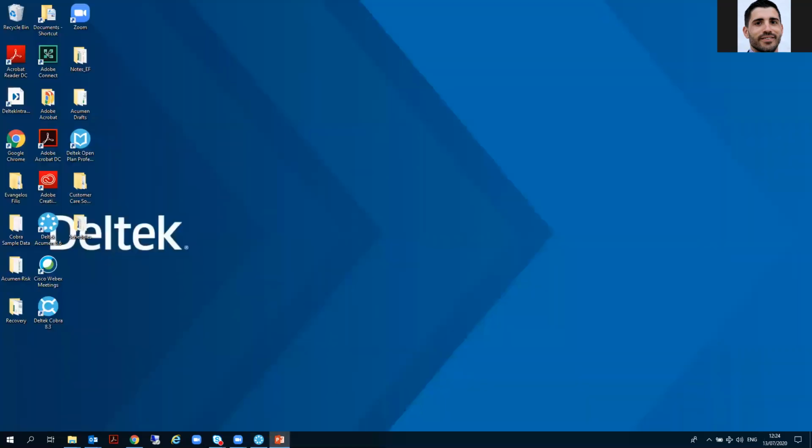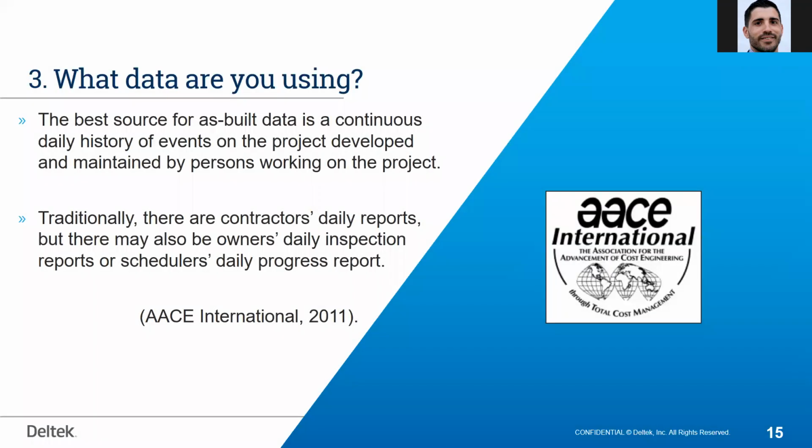Let me jump into the presentation. Okay, the third part is that if you have to create schedules later on just to analyze claims, it will be a lot of work. So you're going to need as-built data, or in general a continuous history of events.